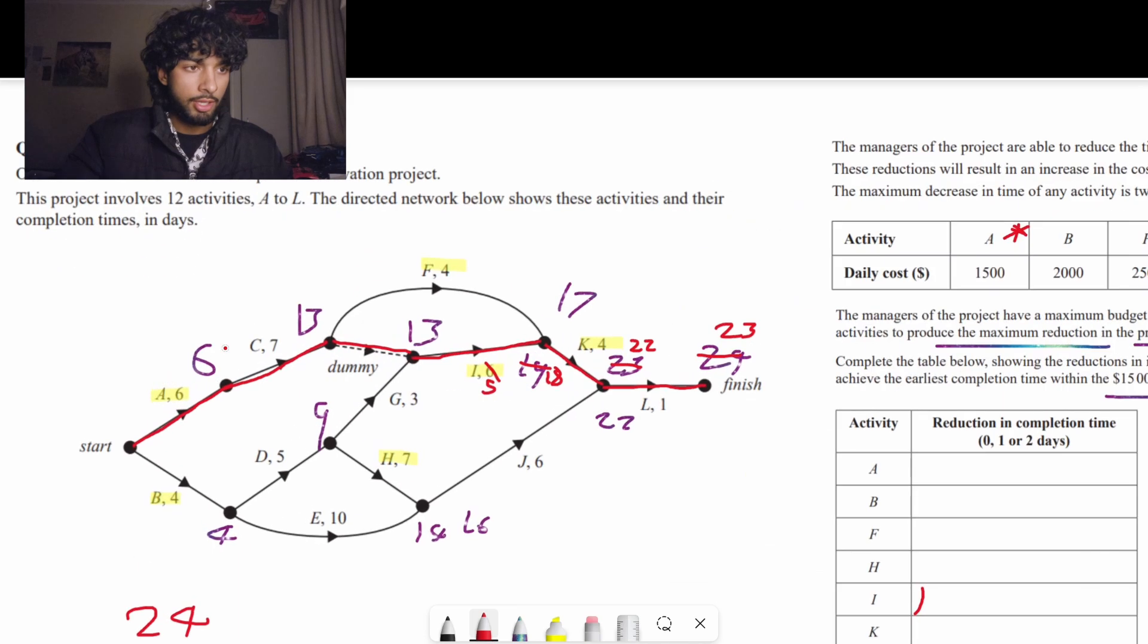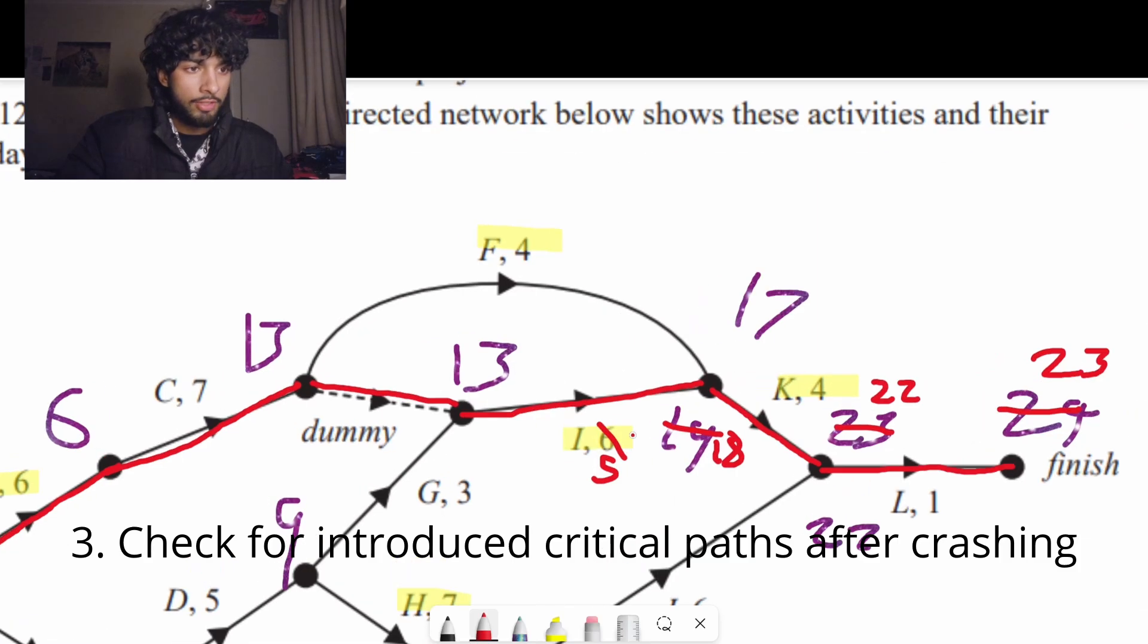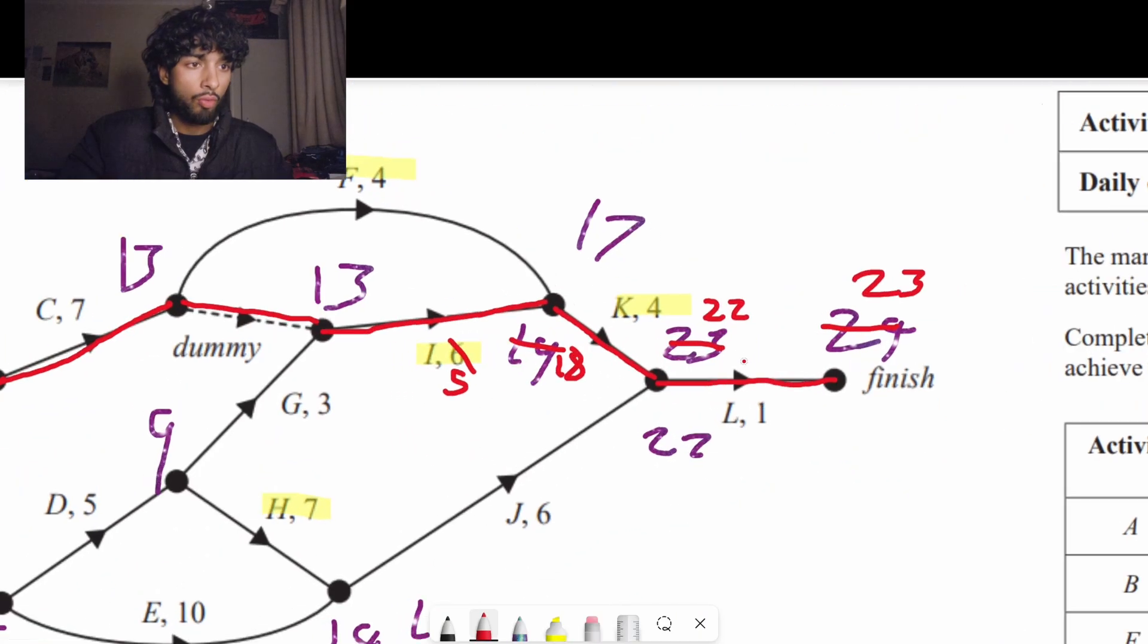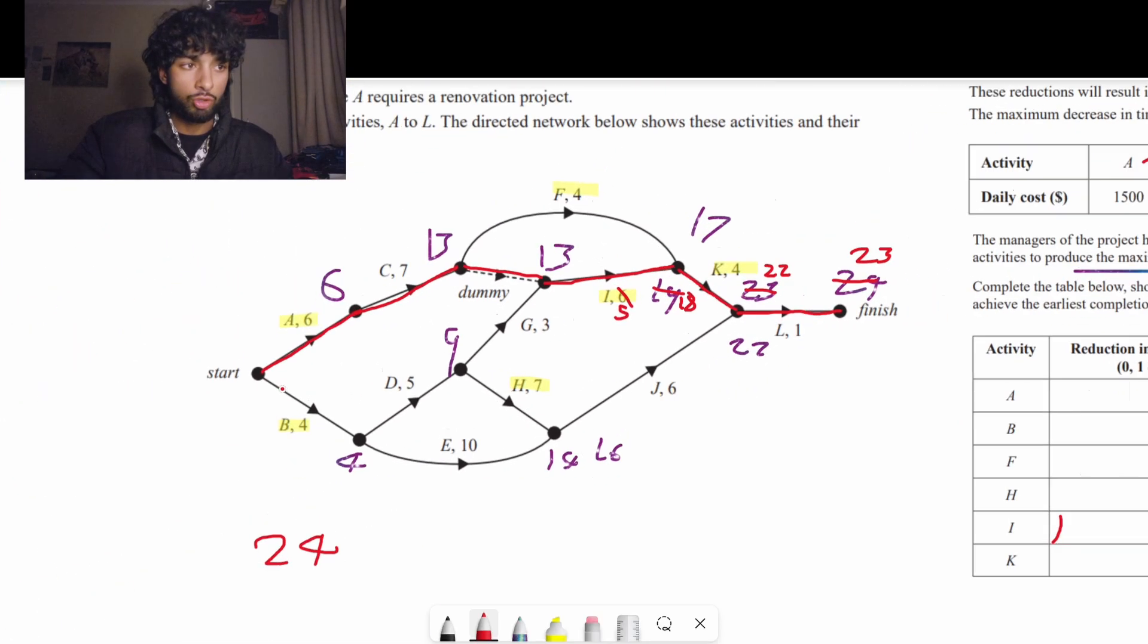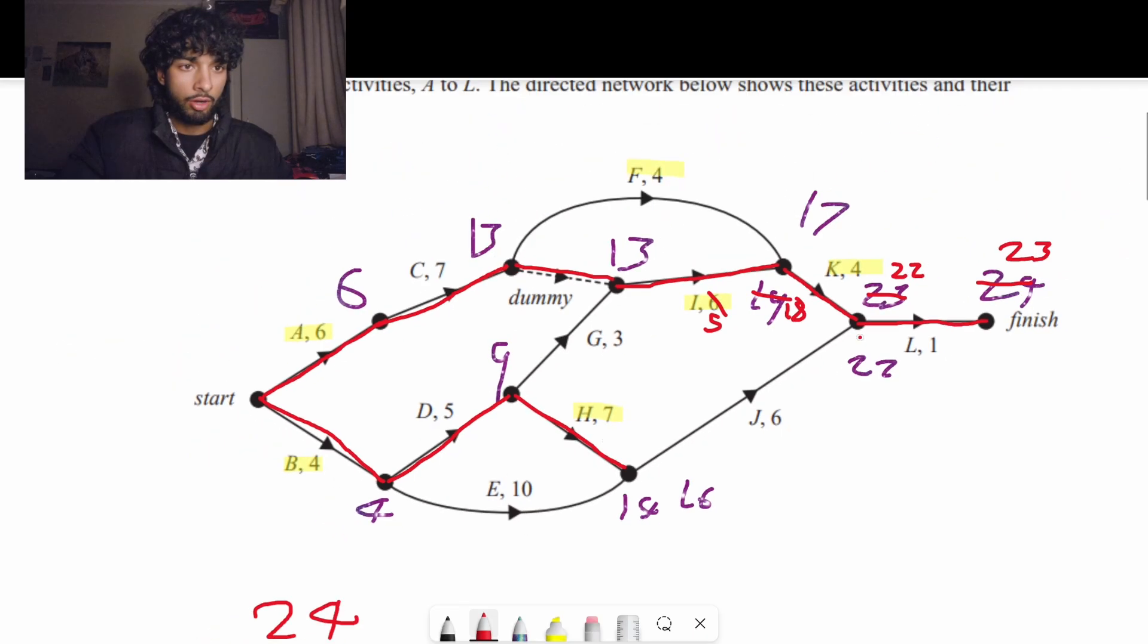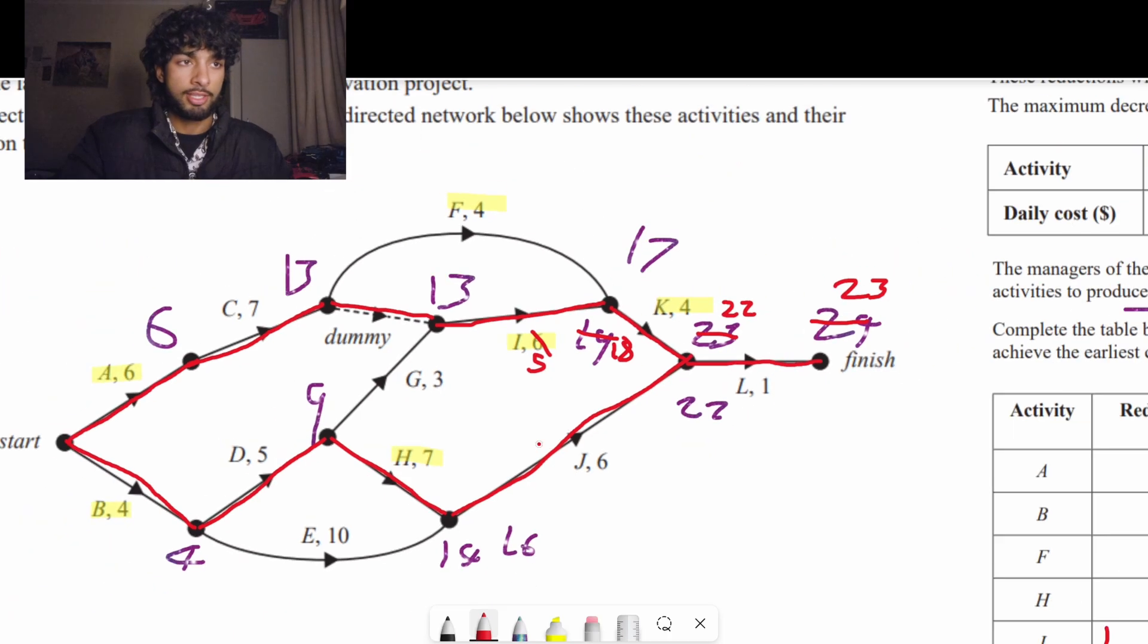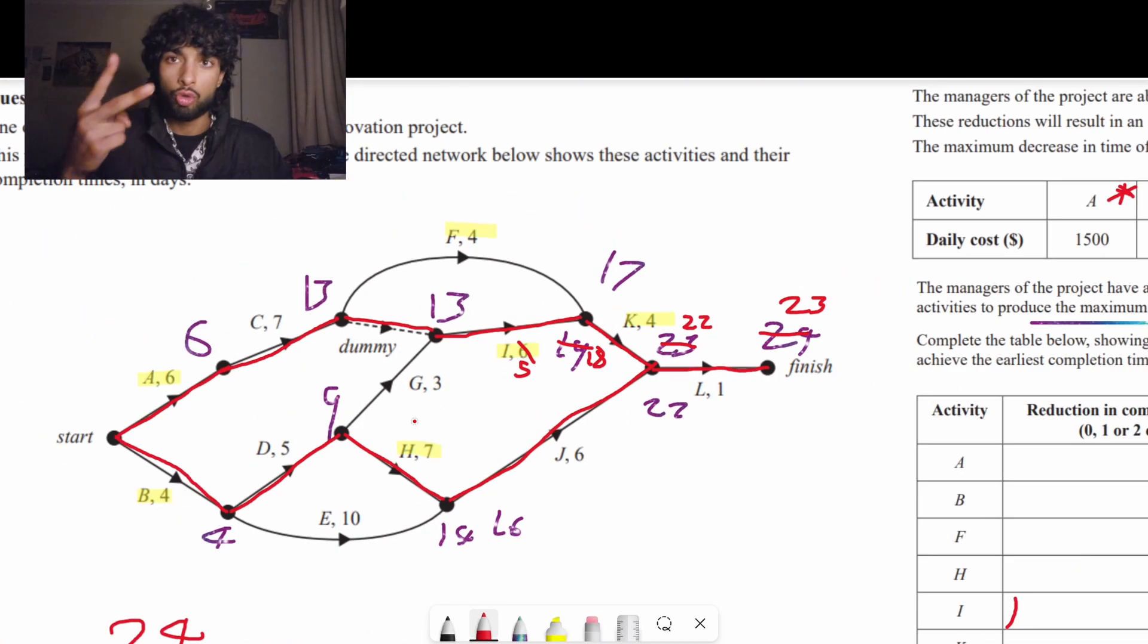Now the next thing is, we have to notice, has anything changed in our diagram? This is still not part of a critical network. But this is 22 and coming up here, it's also 22. So that actually introduces a new critical path going down to b, then up here. This is 22 days long and the other path is also 22 days long. So that means there's now two critical paths.